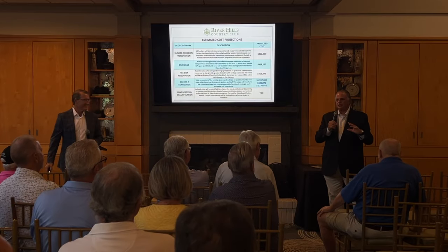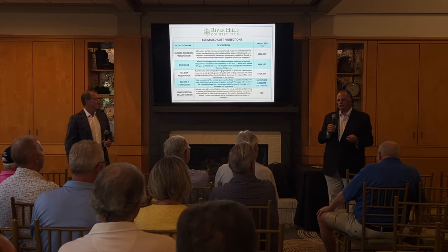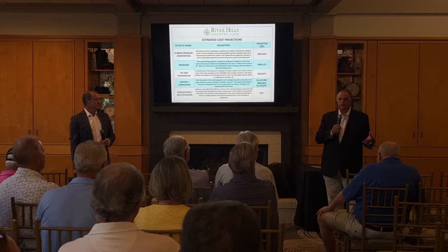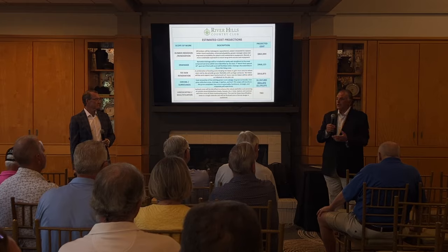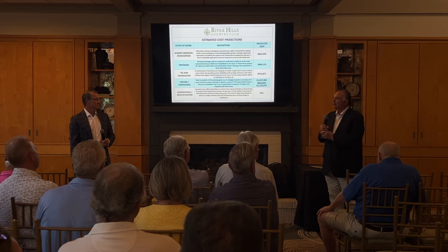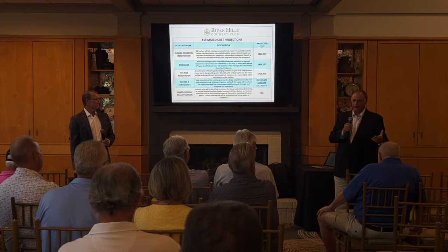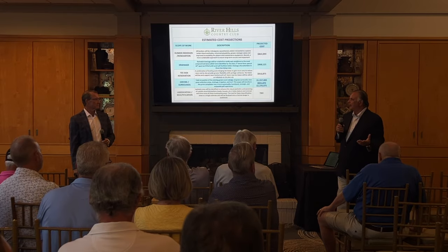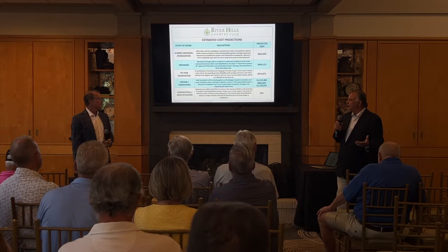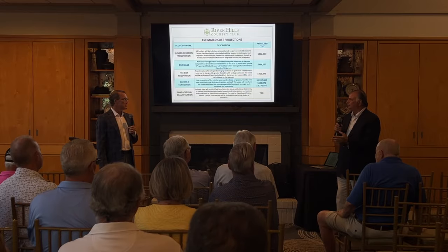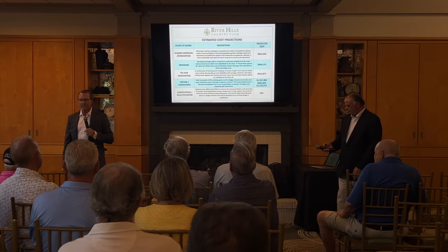If we're going to be as transparent as we can, you've got to take a look at all these numbers. When you talk about permitting, project management, contingencies, you've got to think about at least another 10%. But then again, it depends on which projects we can save on efficiencies or not. Think of a good round number, at least about 10%, if not a little bit more, maybe 10 or 12. Between contingencies, project management, and permitting, it's probably higher than 10%.